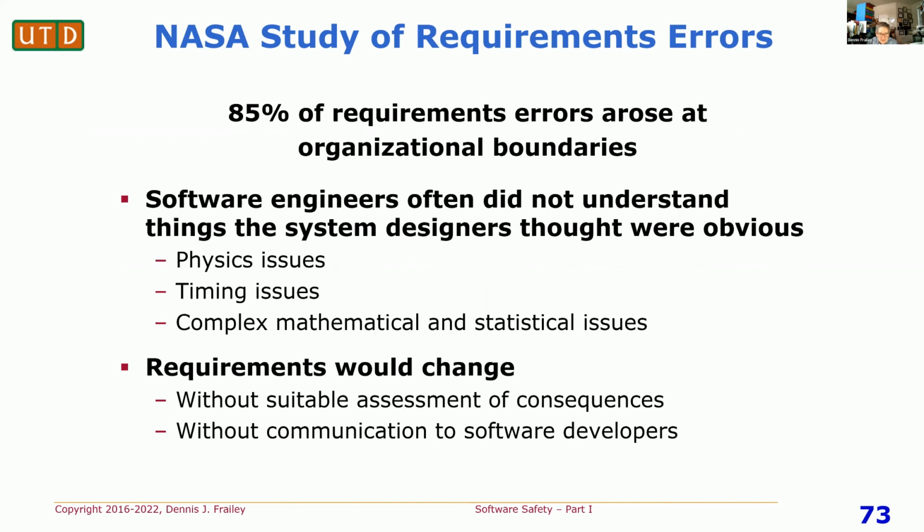Well, it turns out that one thing enabled them to get things done on time. Whenever they proposed a change, the system engineer might say, oh, this seems trivial. The software manager said, no, that change will add 3 weeks to the schedule. The point was that they wanted the people making the changes in requirements to understand the consequences of the changes.